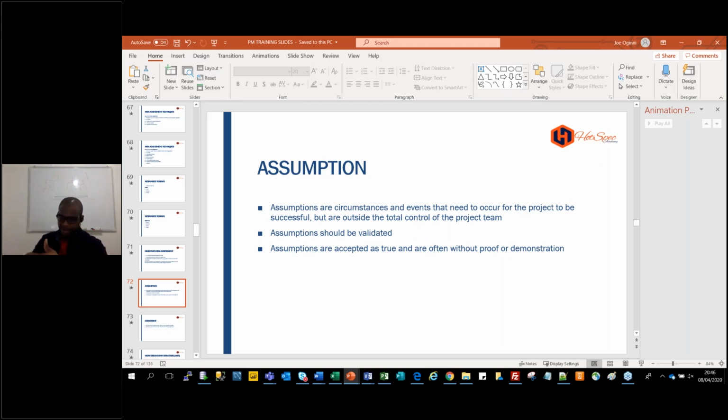It has a set of minimal requirements as to what platform it is going into. Now, my assumption is that when I'm coming to you, I've already written my scope of work. I'm assuming you have the right operating system, so in case my installation fails, it's not my fault. I've written down the assumption. I believe you have it.